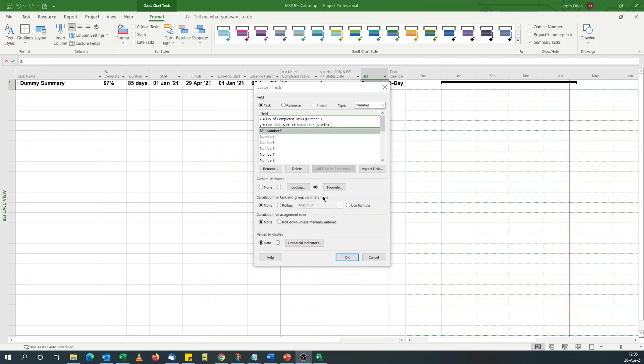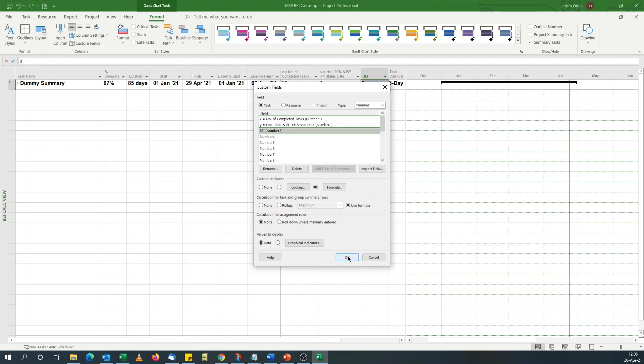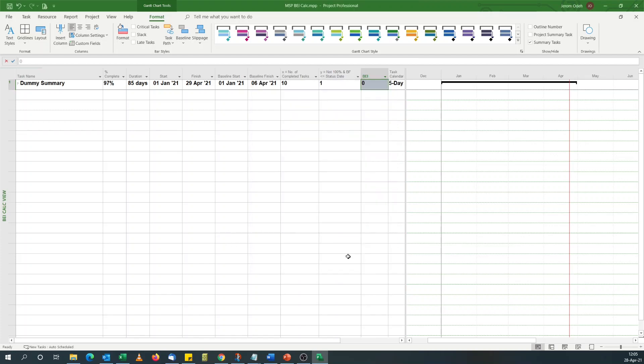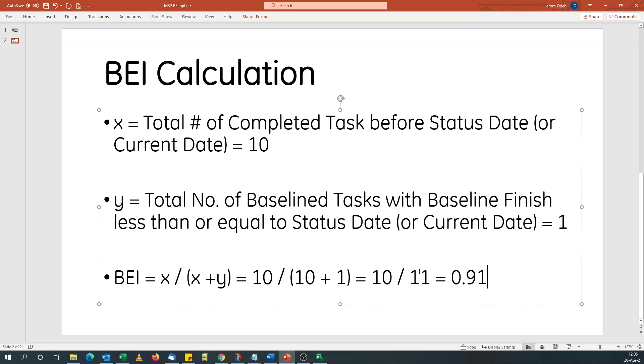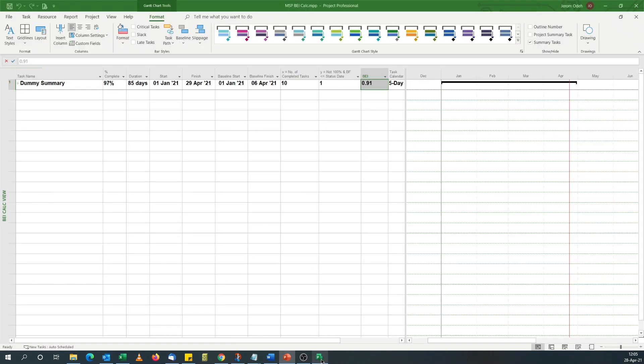With our formula sorted, we now need to look at the summary task for group summary rules. We're not going to do a rollup this time. We just use the formula, since the formula accounts for summary. We'll say use formula. And voila, 0.91, which is the same as what we calculated manually.